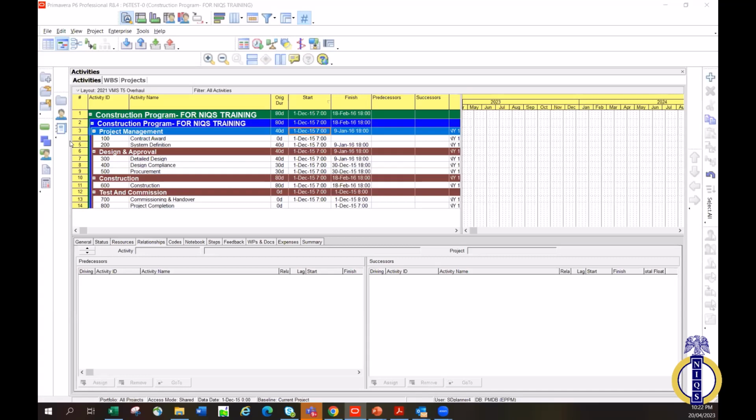So you have to tell me how long it's going to take, in places where there are no norms, from your expert judgment. This is the makeup of my team, this is what I want. The SME will give you the breakdown of those activities. Of course, with time, after some years of doing the same thing, you become an SME yourself. But for that time, you need to have a good relationship with those people, and they'll give you the breakdown of how things run, and you make them sign off after developing your schedule.